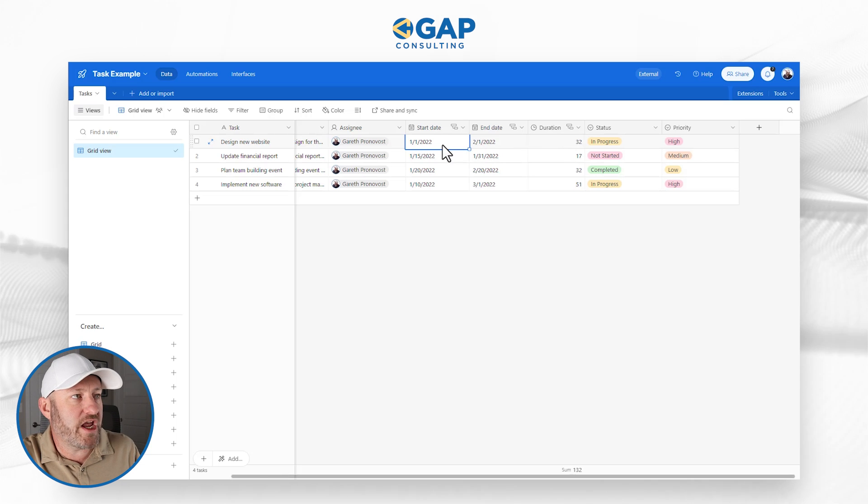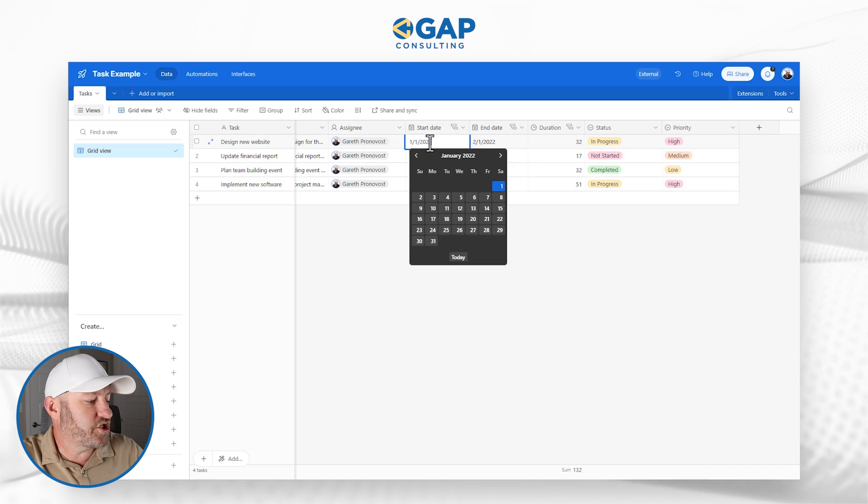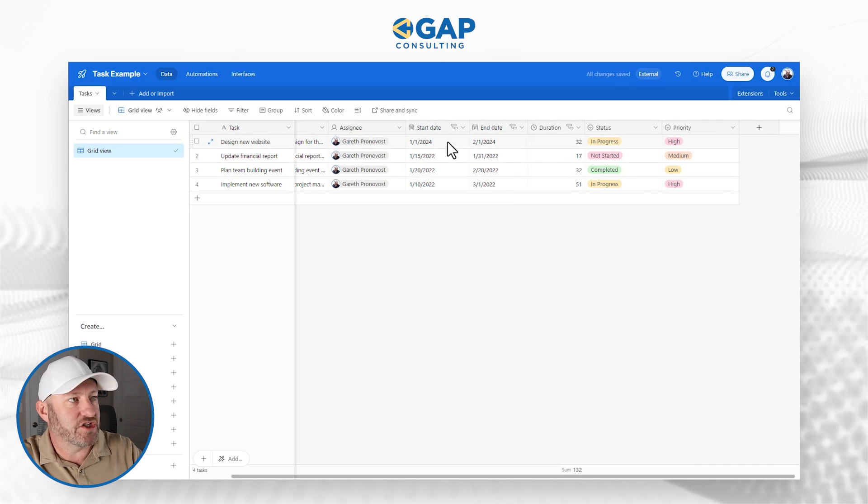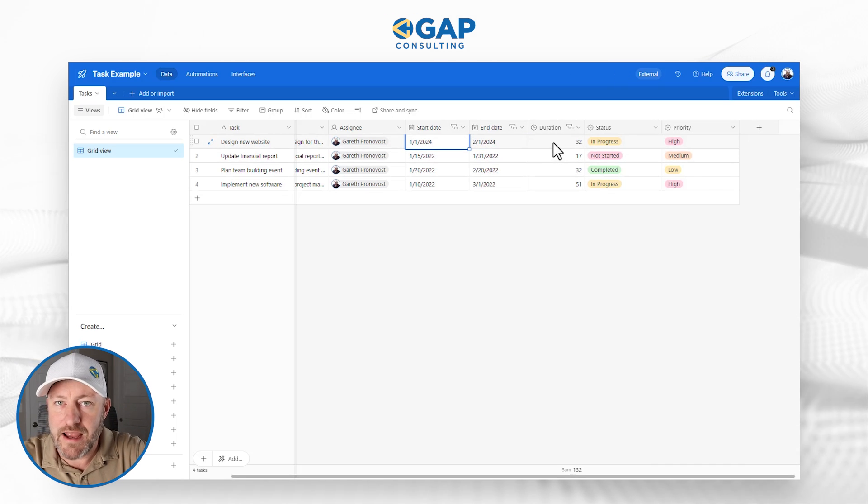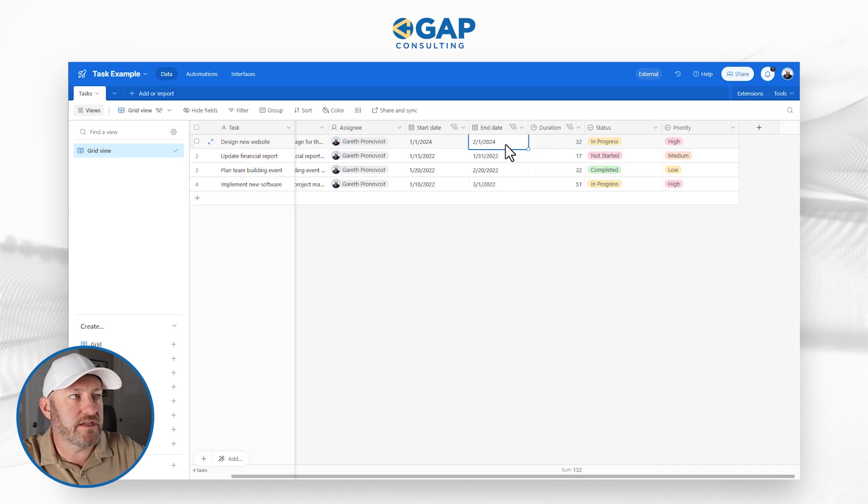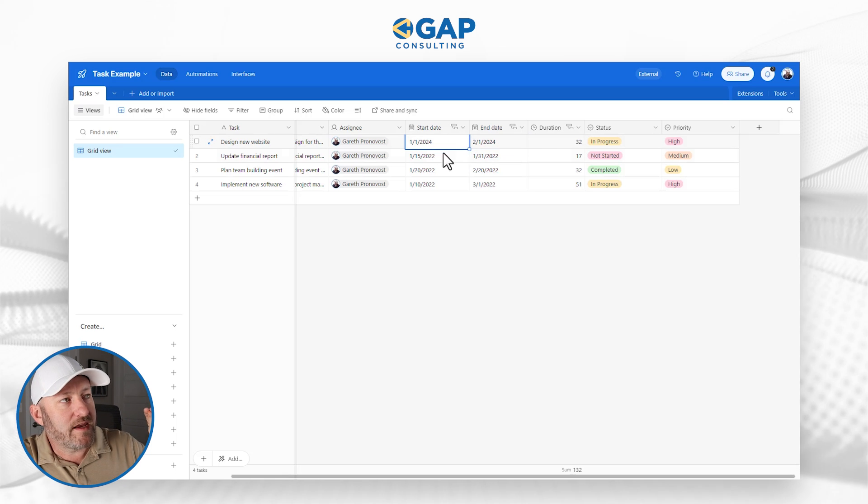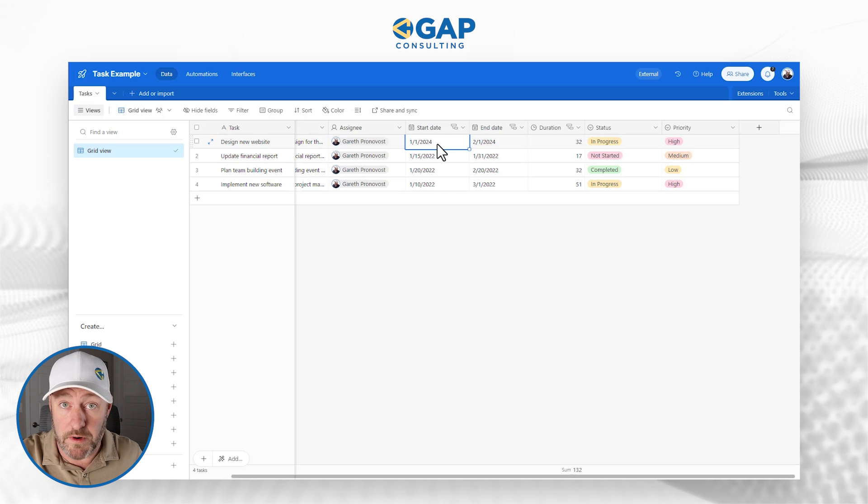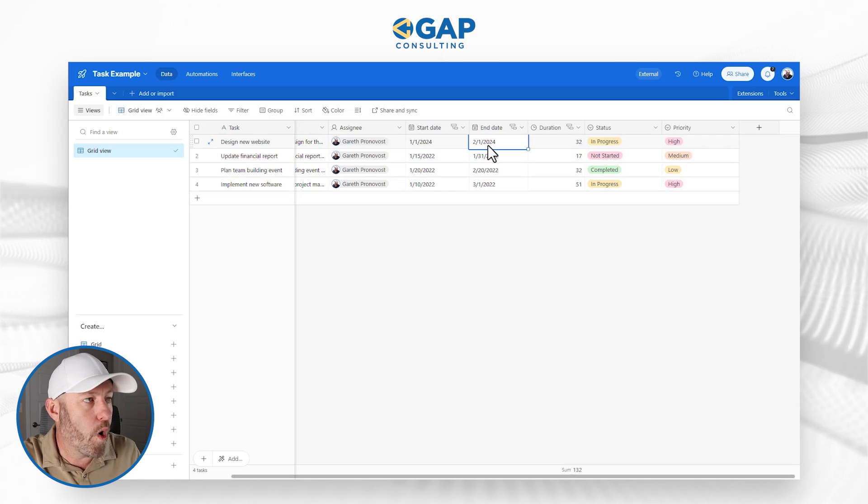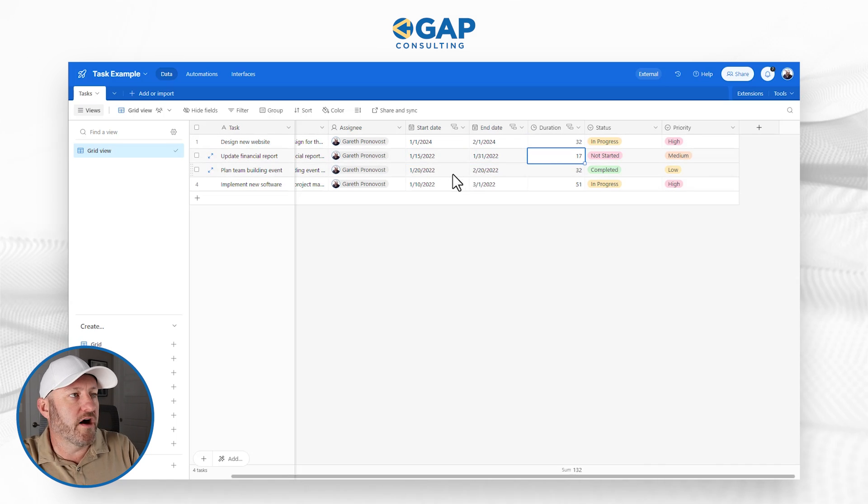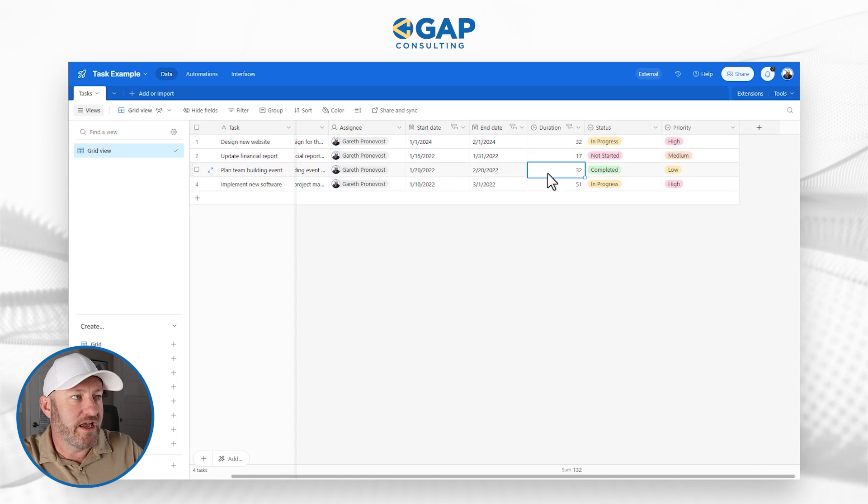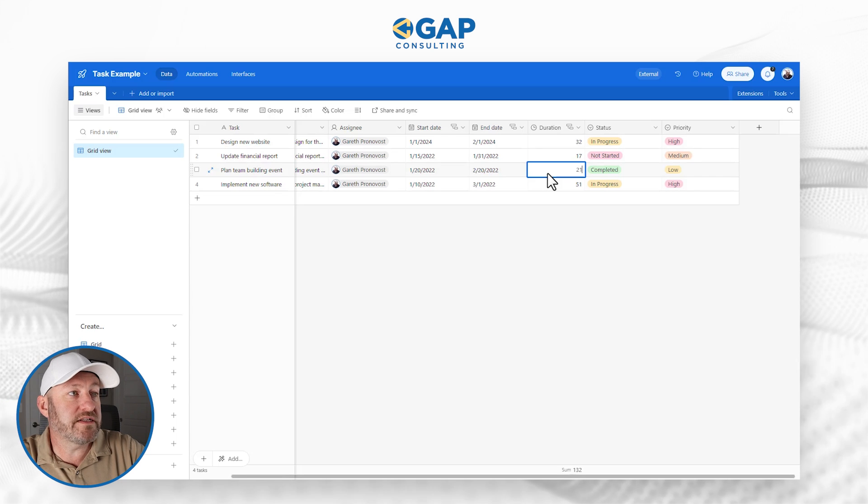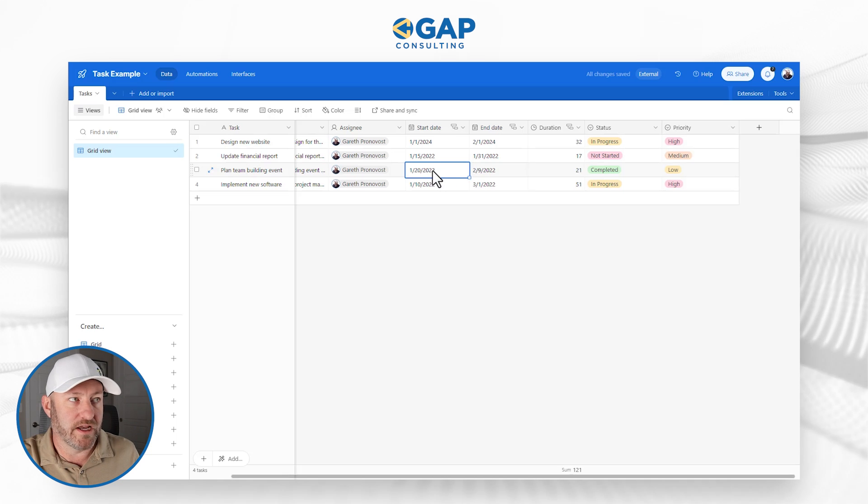And now a change to any of these fields will be reflected in other fields that depend on that. So for example, if I change my start date here, let's say this was actually supposed to be 2024, right? January 2024. You see that as I make that change, my end date recalculates as well, because I made a change to my start date. My Airtable account knows that this particular task takes 32 days. And so it's going to calculate 32 days from there. By the way, I should point out that this is calculating using the start date as like day zero, and January has 31 days. And so 32 days from there is what gets us to Feb one.